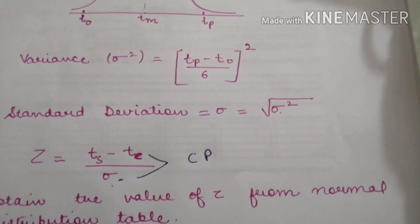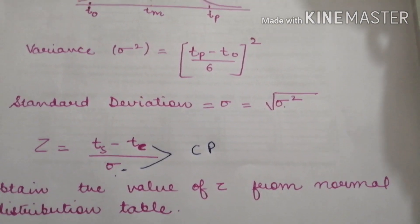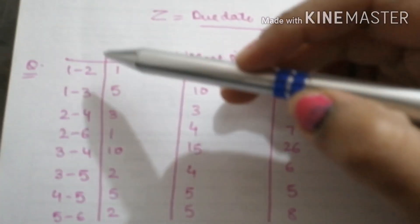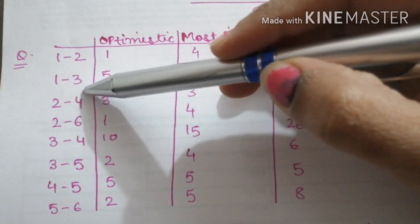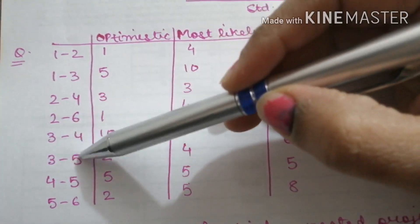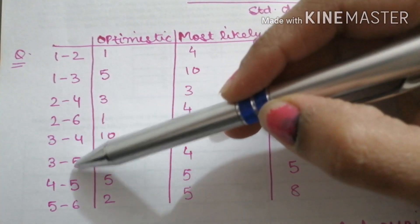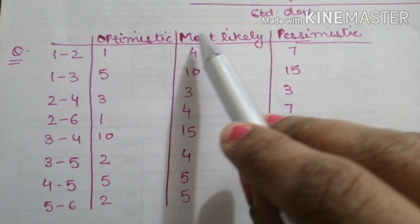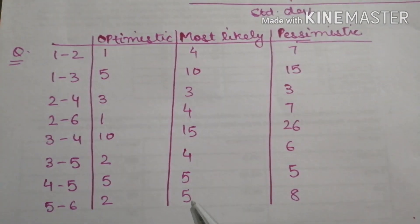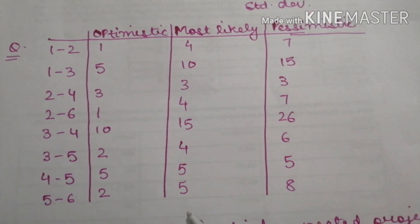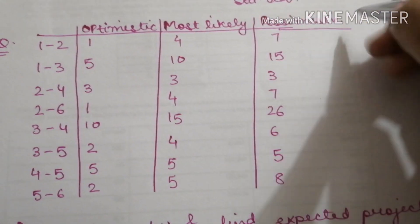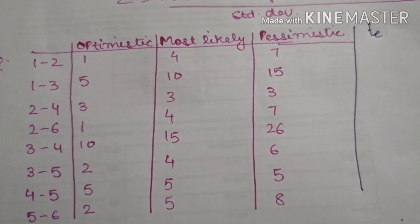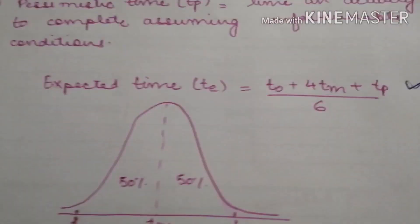Let us understand this with the help of an example. We have a question with activities 1 to 2, 1 to 3, and so on — 8 activities in total. For every activity, we are given the optimistic time, most likely time, and pessimistic time. We will calculate the expected time period using the formula.